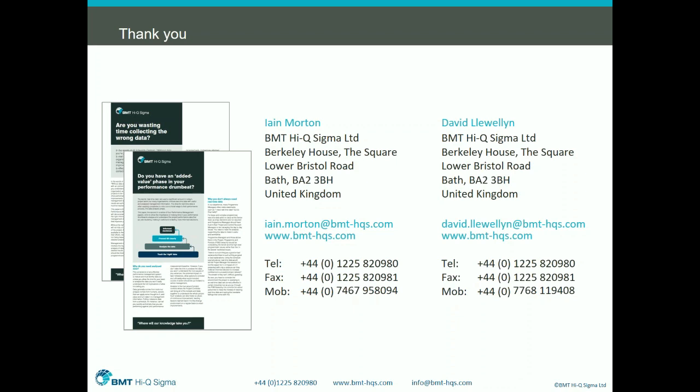Yeah, I think that's the key point for me with that one, which is around the behavioural piece. Often people don't put red on there simply because of the culture or the behaviours operating across the programme, and that's something we have been trying to do, which is to coach people into accepting red on a dashboard. What isn't acceptable is, of course, if red is on a dashboard and it's not understood. If you don't put red on a dashboard until it actually hits you, then you've got no time to deal with it. That's something we certainly strive for and push: to be open and honest and get that culture of trust across the entire programme.